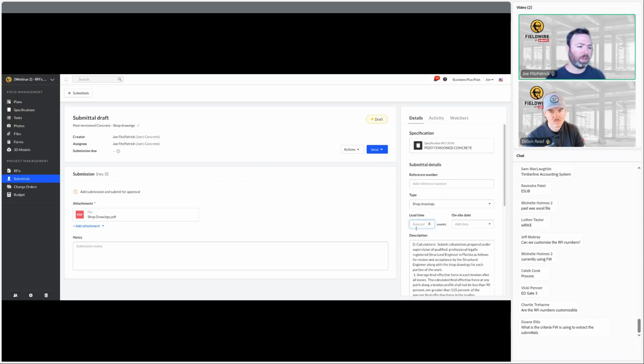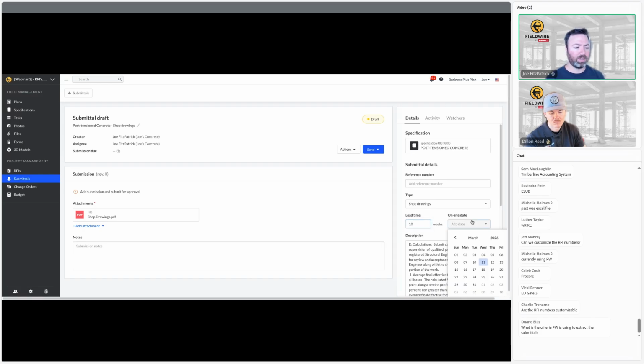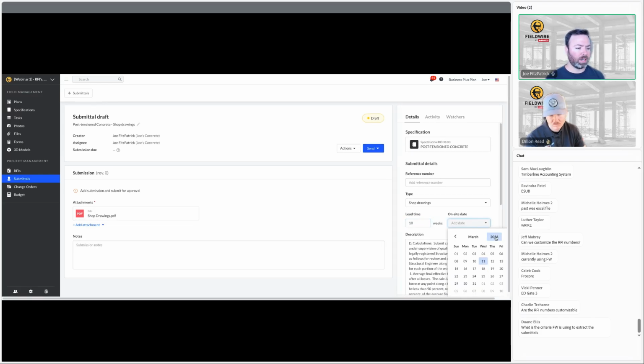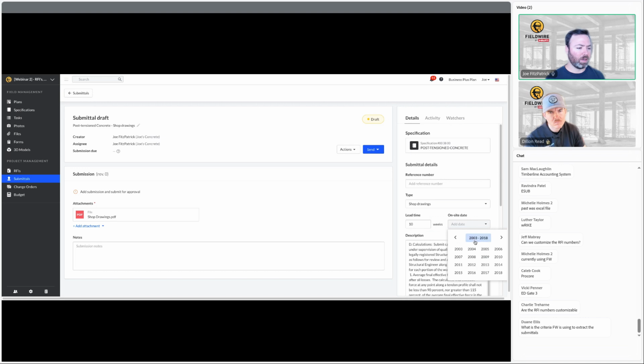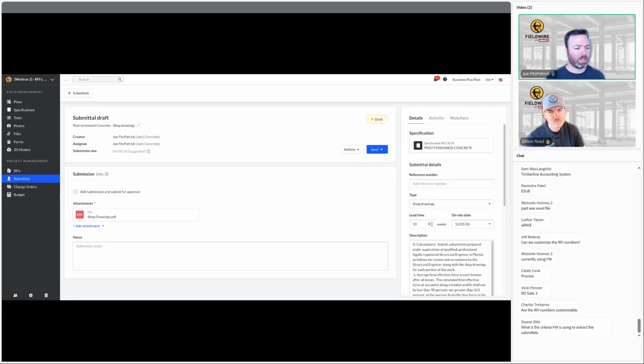And then maybe let's add in a couple other things. So we could put in a lead time. Maybe we know this is like a 10-week lead time. And if we had an on-site date, maybe we know it's going to be, we'll say 2026, we'll say like December 1st.